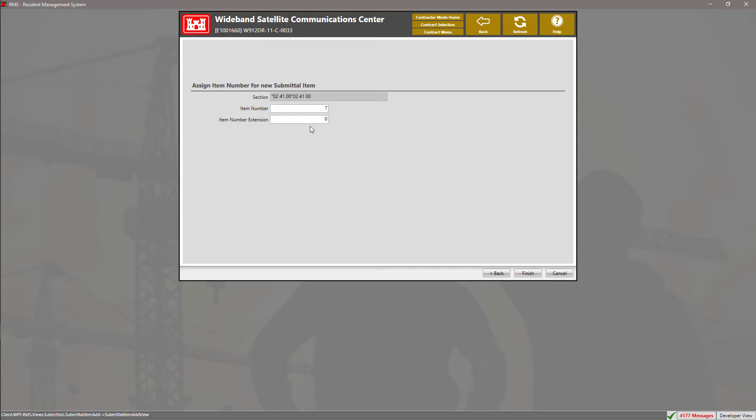The item number extension can be used to differentiate different parts of the submittal item. Once you've created your submittal item and have selected an item number and an item number extension, click Finish.